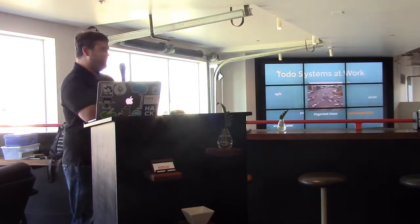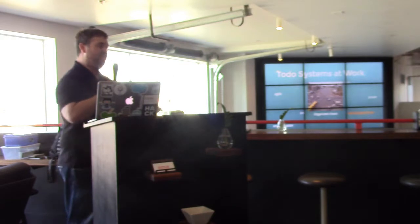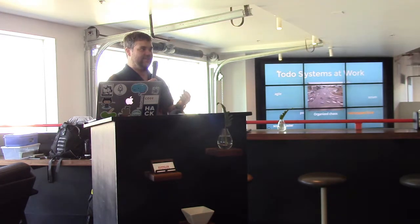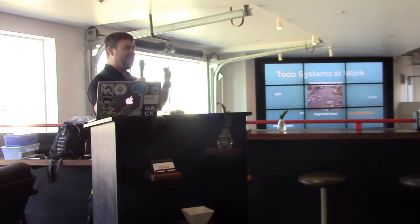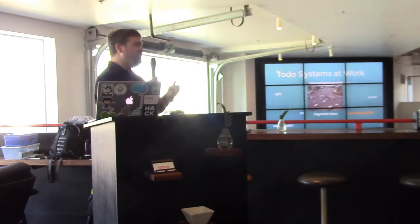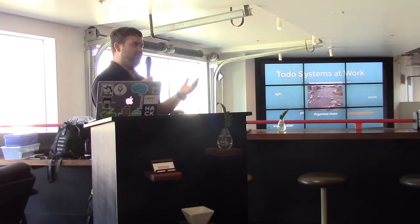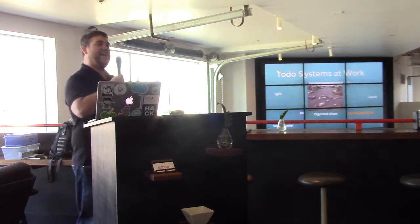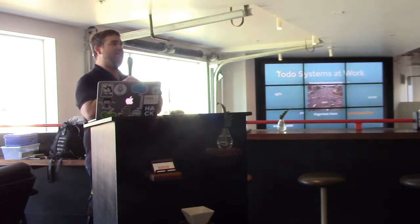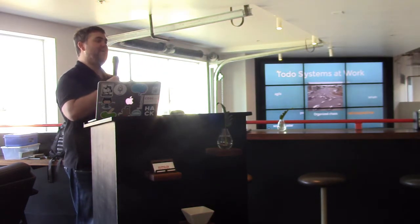But you'll notice that I've colored the word retrospective orange here because of how important that is. If we didn't have Agile, if we didn't have any of these roles at all, and we just had the retrospective, we would actually still be able to get a lot of things done. And that's because with the retrospective, at the end of each iteration, we ask ourselves, what has gone well? What hasn't gone well? What should we do next time? We'll choose 2 things, and those are the 2 things that we're going to try differently next time. That way we can grow our system organically with our team over the days, the weeks, the months, and the years. And in the end, regardless of what label we have assigned to the system of how we get things done, we're going to be able to get so many things done because of that.